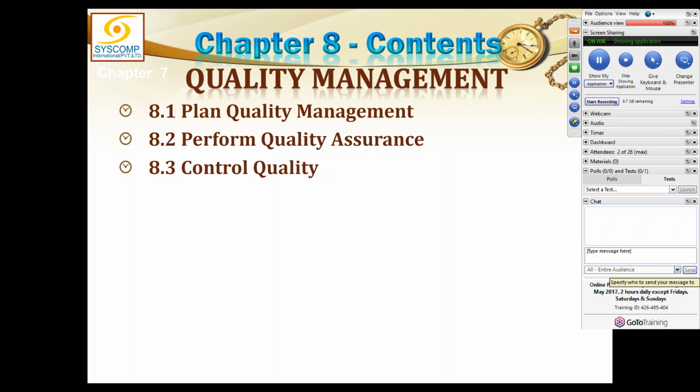So quality assurance is done through audits. It is done during execution, while the process or the work or activity is being executed or in process. And quality control only happens in monitoring and control. It inspects and checks the ultimate product, and by ultimate product I do not really mean the end product. I mean anything coming out of any process is a product.